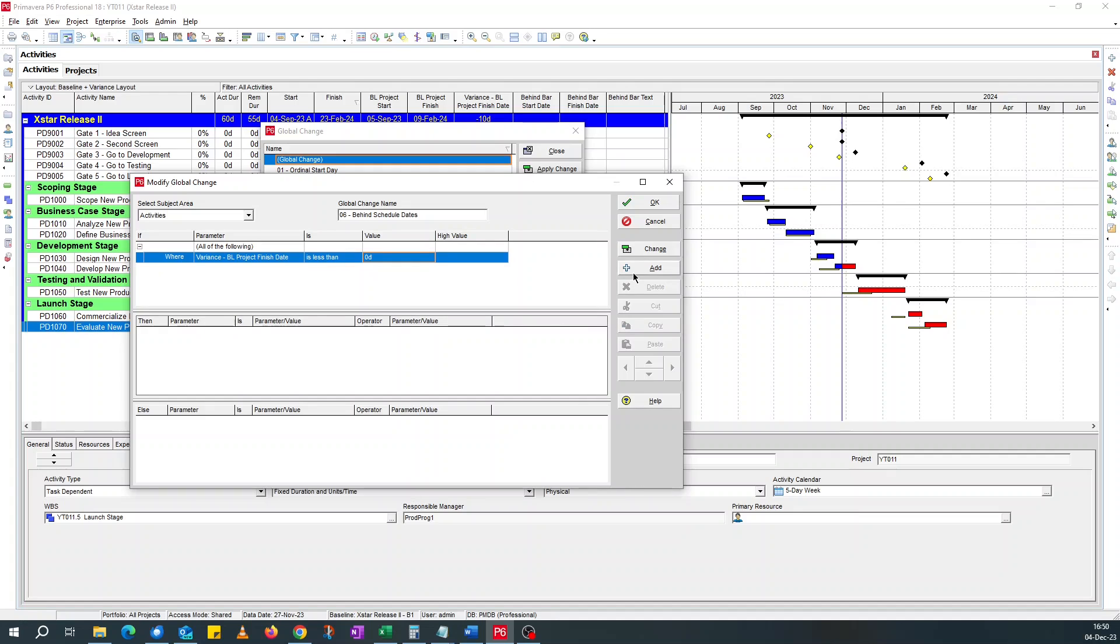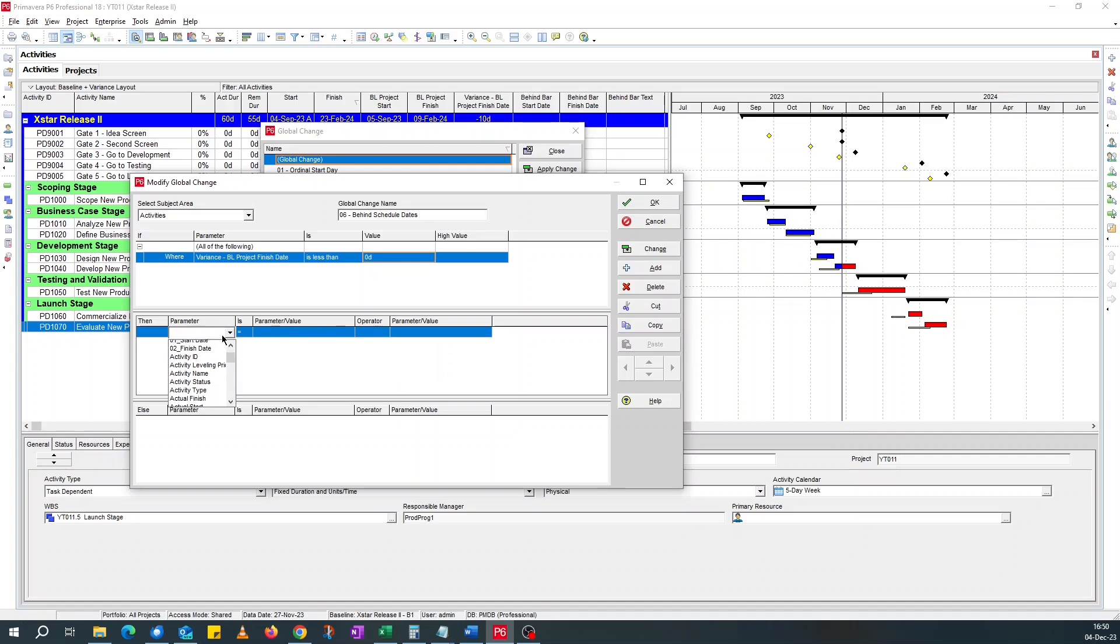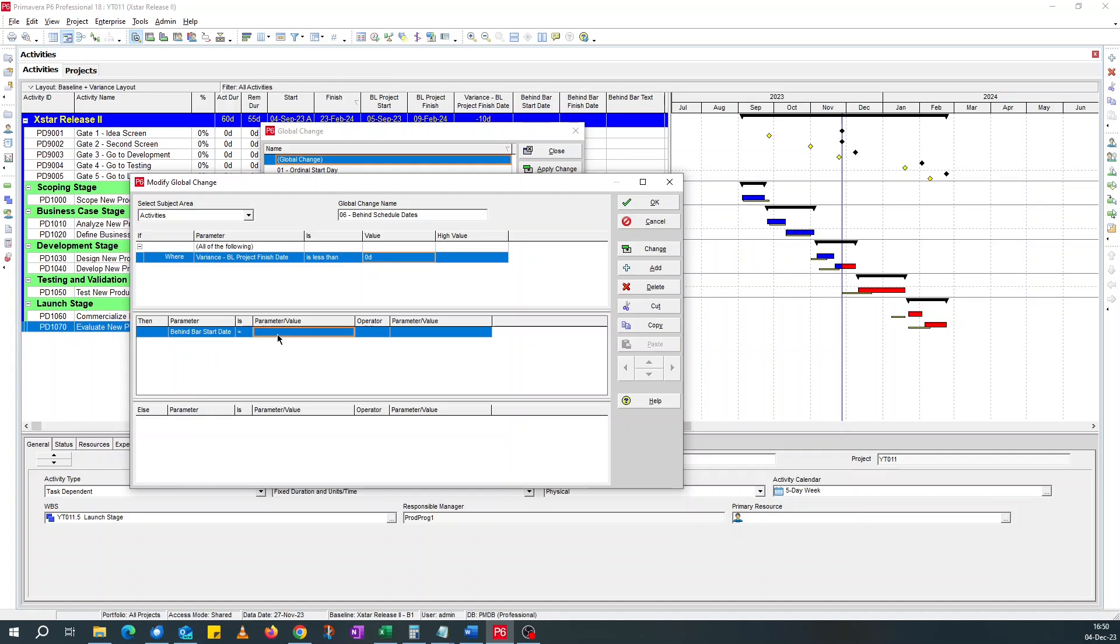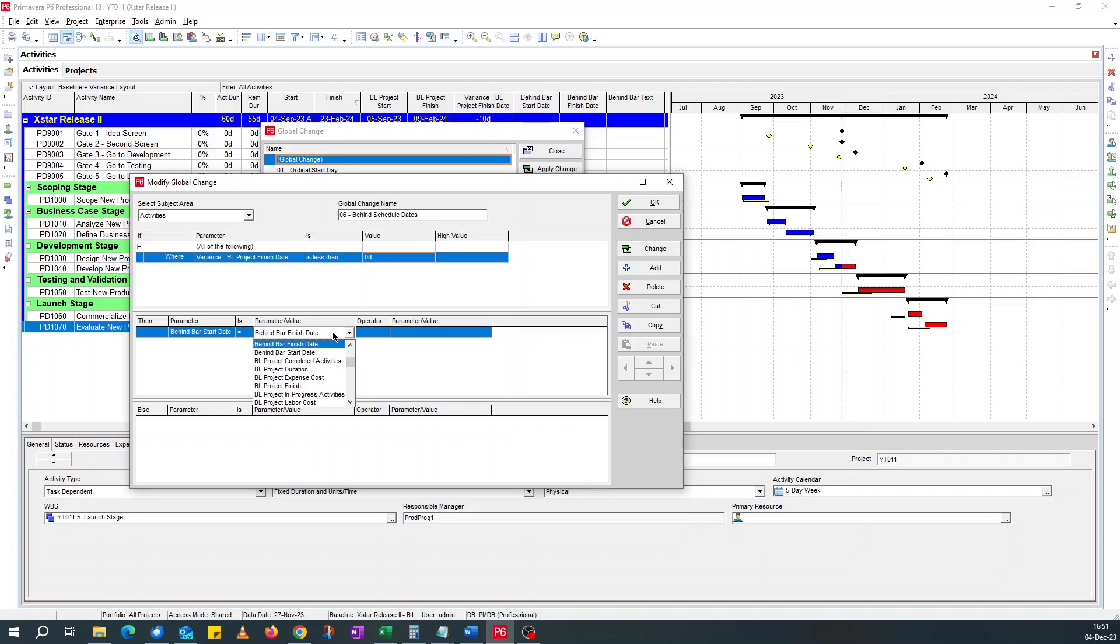Then you want it to do something. And what we want it to do is we look for the user defined field. We start with a behind bar start date. We want it to be equal to the baseline finish date.